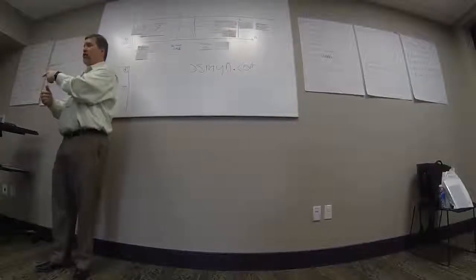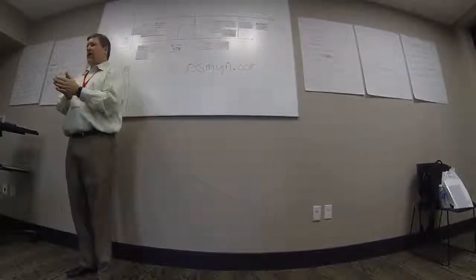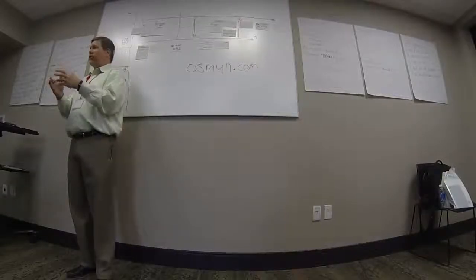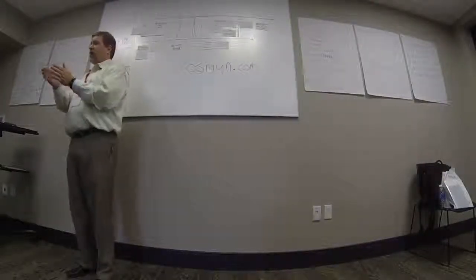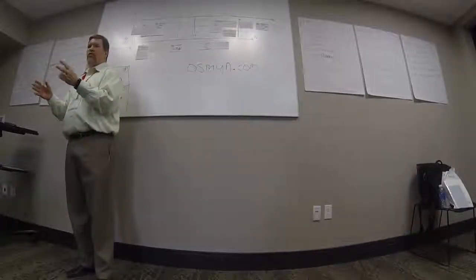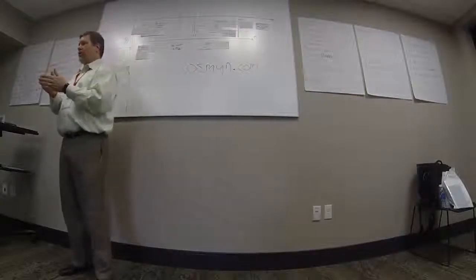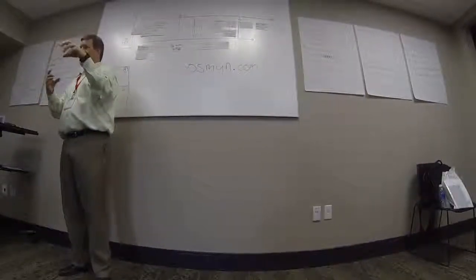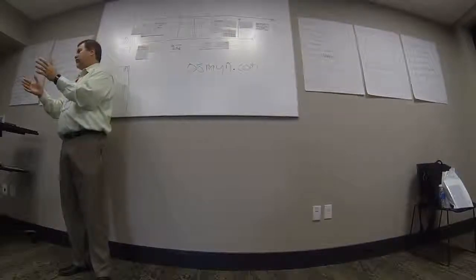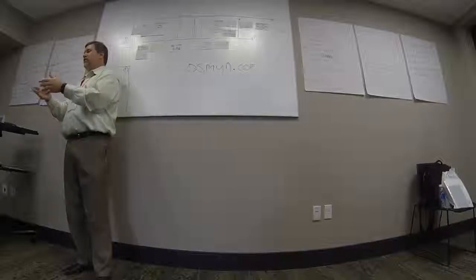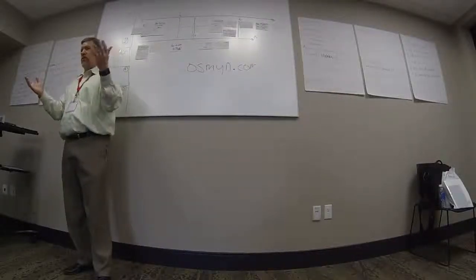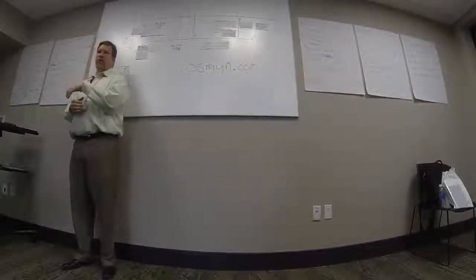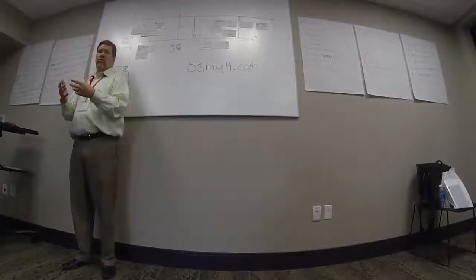And then as far as how much it costs us for each iteration, what we do here, then it's the same kind of deal. We start tracking. Points are separate. They're estimated values. Hours are actuals. So what we do in addition to doing the estimating and points, we actually take and we track the number of hours it takes us to get done with something. So we're tracking those two things and they're separate. And so then when we track the number of hours it actually took us to do a story, as we look at stories that we're going to do in the future, we can kind of make a comparison. Well, we thought that story was a six point. This was a six point. It was a five point story last time. So if this story is five points, it took us X number of hours. That cost $20,000. And that's how we know how much that feature will cost. We're going to be wrong sometimes. Sometimes we're going to estimate low and sometimes we're going to estimate high. But we hope in the end our relative estimating balances us out. Make sense?